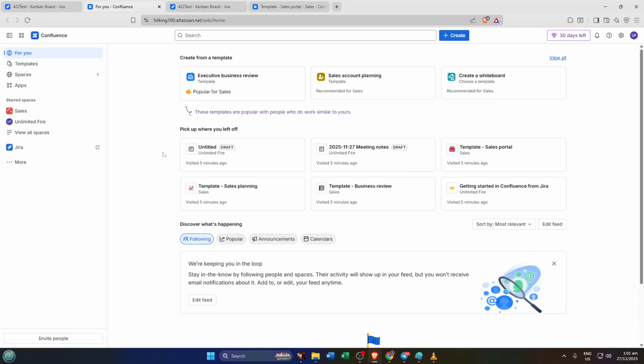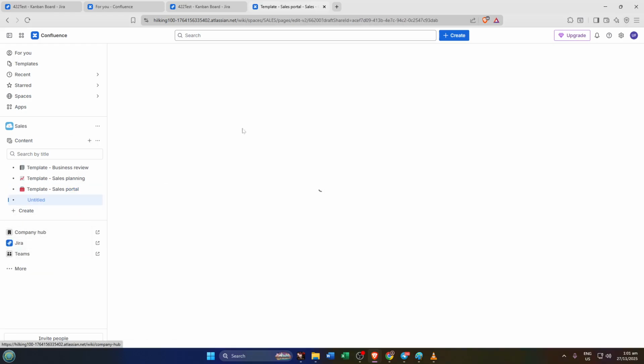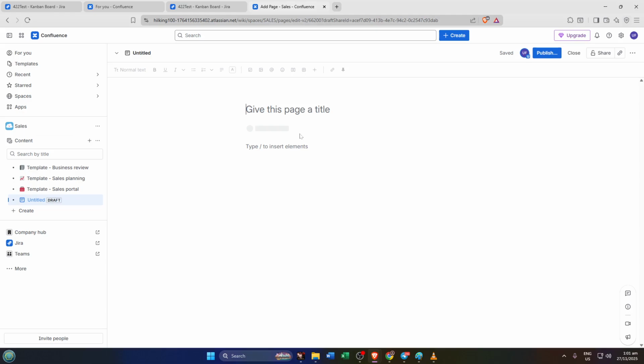Trust me, I know this sounds so simple, but Confluence is built to recognize and work with these links. As soon as you paste it in, pause for a brief moment. Confluence will automatically detect that this is a Jira issue link and convert it right away into what's called a smart link. You'll notice the plain URL will transform visually, showing off the Jira issue's ID, current status, like to do, in progress, or done, and a short summary of the issue itself. This live preview not only saves readers the hassle of clicking through, it gives your page an up-to-date snapshot of what that ticket is all about.